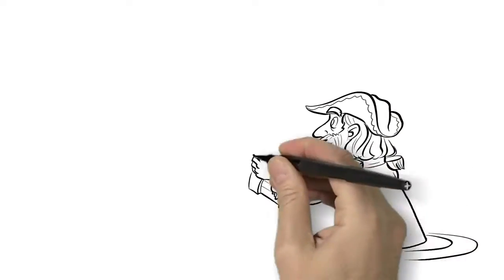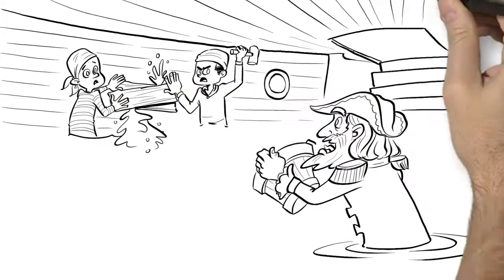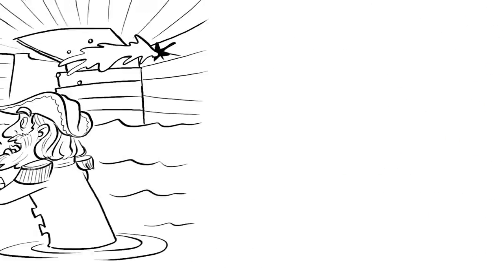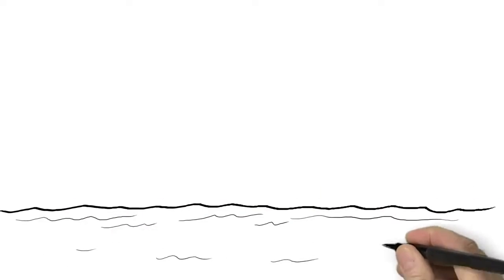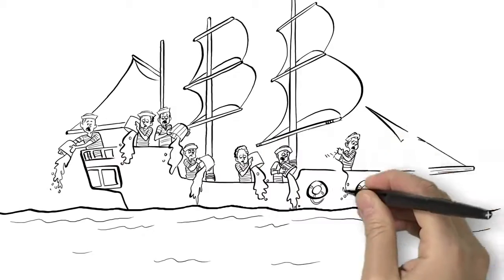To stay on schedule, many captains instead shift crew from repairing and strengthening the hull to bailing. But less repair work eventually causes more leaks. The crew gets stuck in a vicious cycle in which the urgent need to bail cuts investments in leak prevention.